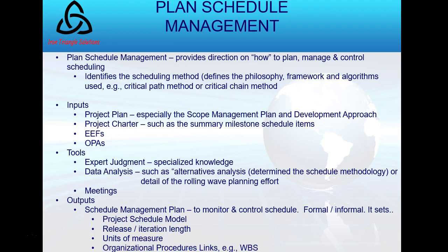Those sort of things. Then I'm going to bring in my charter because the charter covers the project at a high level, we said. And so I'm going to have high-level requirements in the charter. I'm going to have high-level due dates or milestones, and those are going to be in the charter, and expectations of cost. So I would expect to see that. And then EEFs and OPAs, as you'll see in the PMBOK guide as you leaf through it.